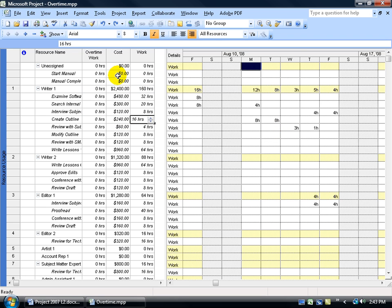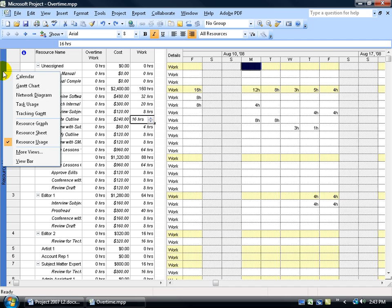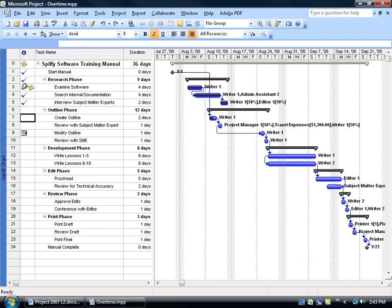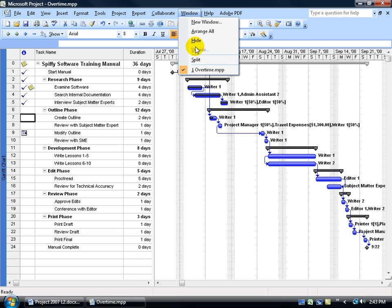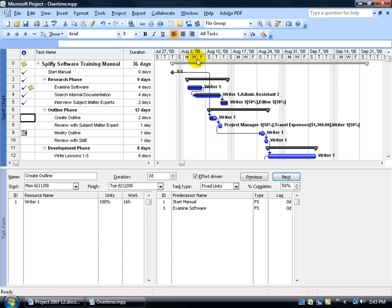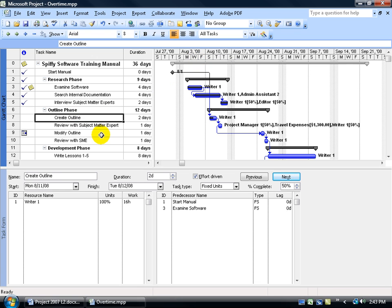Let's go back to the Gantt chart. Right click on the collapse view bar, go back to the Gantt. Then come up here on the window menu and go down to split, as you recall in our level 1 training video. We're looking at the create outline, it's a total of 2 days, 16 hours. There's the resource assigned to it at 100%, 2 days, 8 hours a day for 2 days, that's 16 hours.